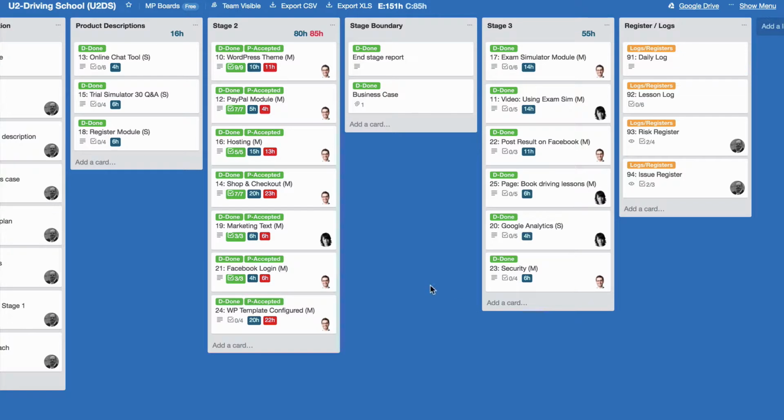This is where we left off from before. We had just planned for stage 3. And now the first thing I will discuss is how the project manager can hand out work to the team members. Well, this is a small project, so the team members, we just have 2 of them, will report directly to the project manager. So the project manager can say, well, there are a couple of rules here. You're only allowed to work on one product at a time, and you have to choose from the top. So if the project manager wants to prioritize something, they can just move it to the top like this. Okay, so the team members know what they have to do. So that's basically it. It's a very, very simple way to work on it.